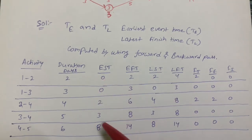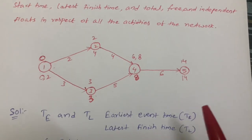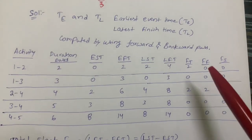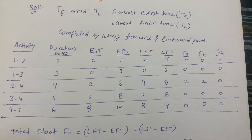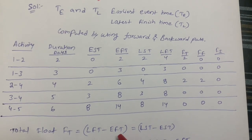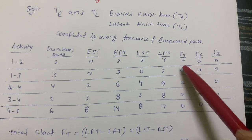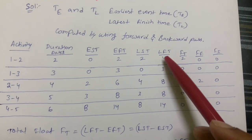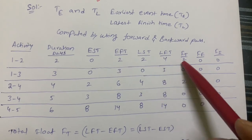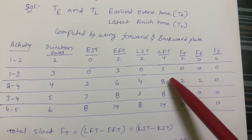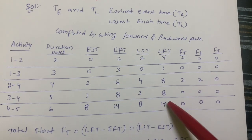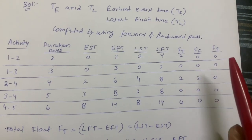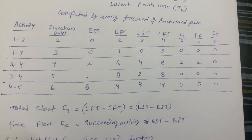Next we calculate total float (TF) = LFT − EFT (or LST − EST). So: 4 − 2 = 2, 3 − 3 = 0, 8 − 6 = 2, 8 − 8 = 0, and 14 − 14 = 0.